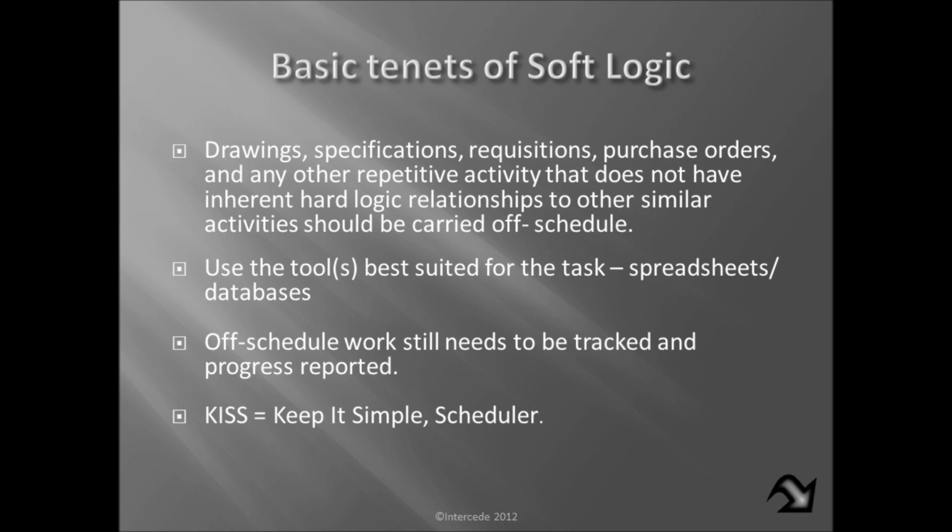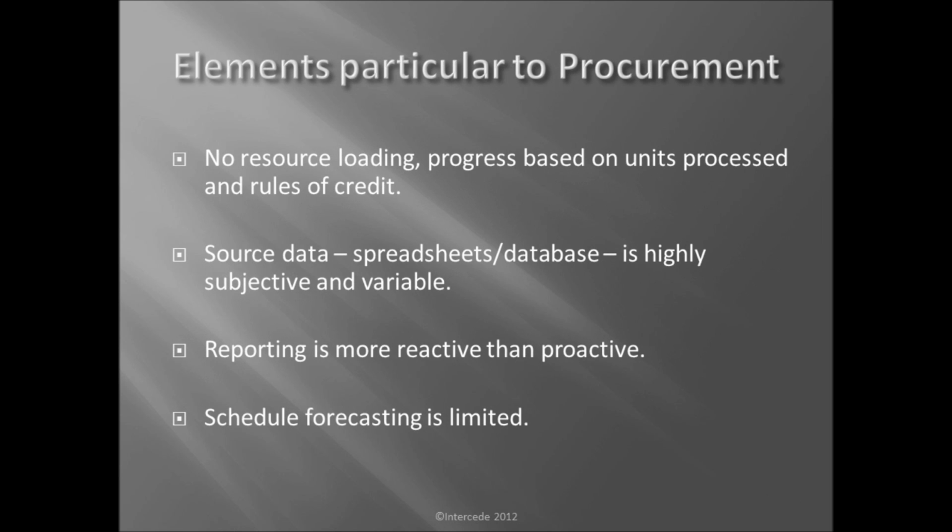However, with all elements in soft logic, remember everything has to be tracked. Just because we're not putting it on the schedule does not mean we don't want to know where it is. So what we want to do with our schedule, though, is keep it simple. Now, if you saw the previous installment on engineering, a couple things will appear to be different here. The first of which, there's no resource loading.